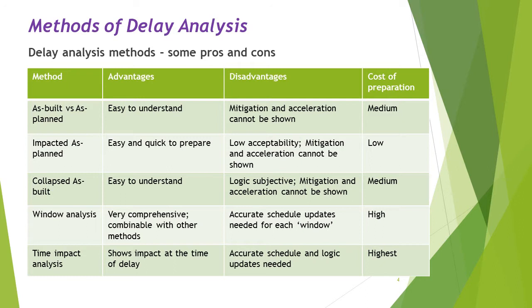For Collapsed As Built, it's relatively easy to understand and has a medium cost of preparation. The subjective logic is a bit of an issue, and again, mitigation and acceleration are hard to identify.